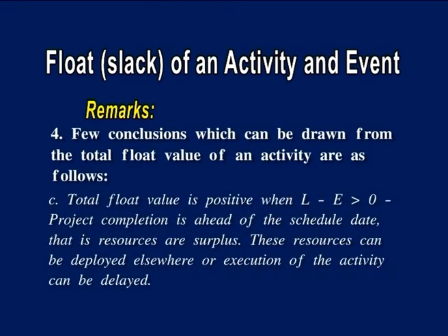Total float value is positive when L minus E is greater than 0. Project completion is ahead of the schedule date, that is, resources are surplus. These resources can be deployed elsewhere or execution of the activity can be delayed.